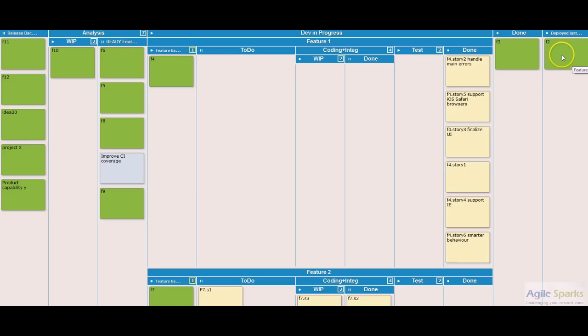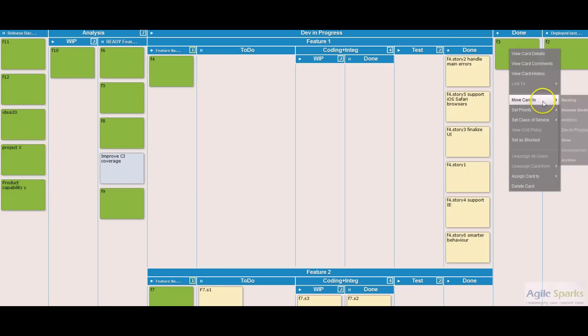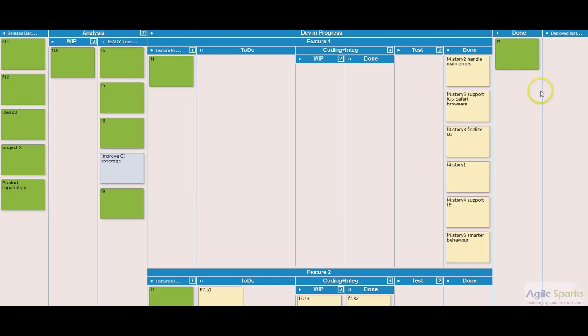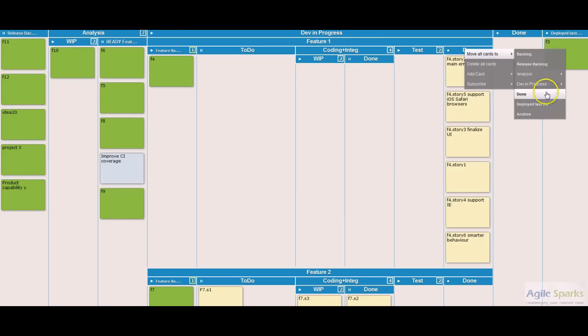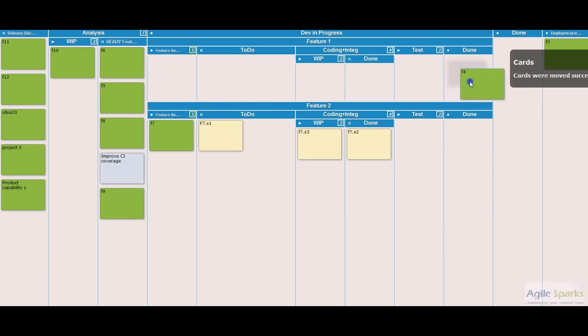reached the next deployment cycle, and now we can say feature 2 is now in the archive and feature 3 has been deployed, even though feature 4 has not been finished. Now hopefully, if we're in front of a deployment cycle, the team will be energized enough to actually finish this feature and get it into the deployment cycle in the last moment. Okay, so that's something that the cadence and the time box can provide us.